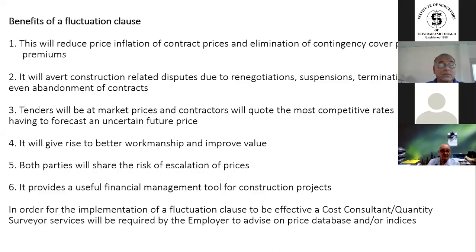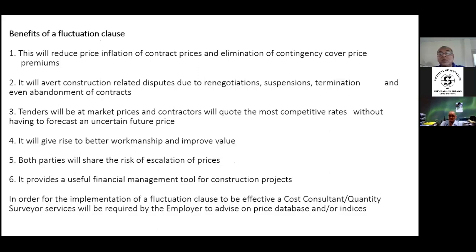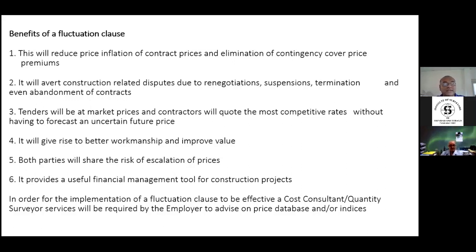The benefits of using a fluctuation clause or fluctuation mechanisms: it will reduce price inflation of contract prices and eliminate contingency cover price premiums. It will avert construction-related disputes due to renegotiation, suspension, termination, and abandonment of contracts. Tenders will be at market prices and contractors will quote at the most competitive rates without having to forecast an uncertain future price. It will give rise to better workmanship and improved value. Both parties will share the risk of escalating prices. It provides a useful financial management tool for construction projects.